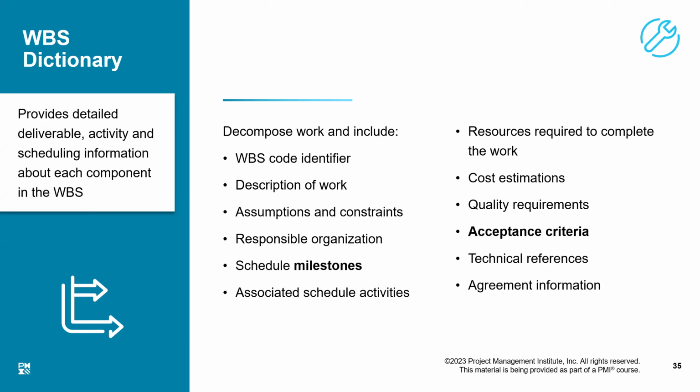If there are any associated assumptions and constraints, it could be like a table, where these are the various things which could be the columns. So every work package may have a number, a description, assumptions, and all these points. It is not necessary, but it is sufficient to have a basic structure of the WBS dictionary, which may not be as detailed as shown in this slide, because that makes things a little more clear, but at the same time complex.